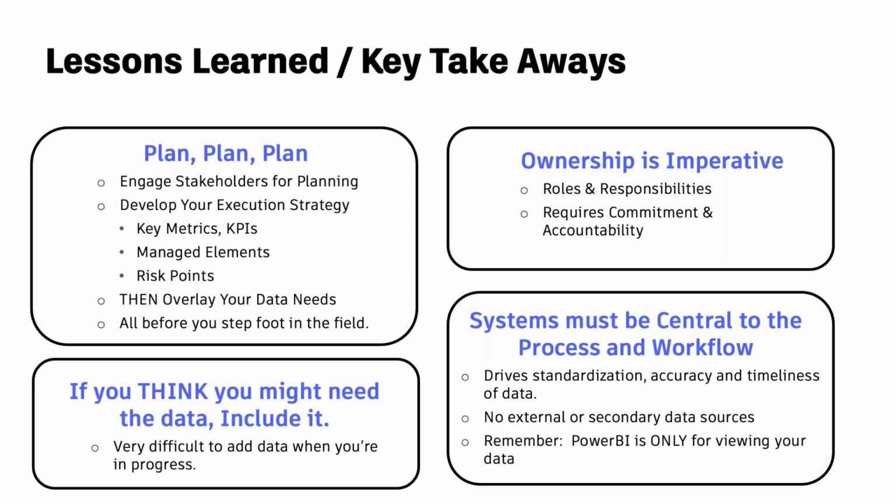Because you're always going to put yourself in a situation where you're going to introduce doubt to what's showing on the dashboard, because you don't know if it's coming from a primary certified data source or if it's something that someone else has added in. You're always going to be in a mode of reconciliation. Identify your key sources in your systems and enforce their use. That will drive standardization in data, accuracy of your data, and the timeliness of your data if you do that.